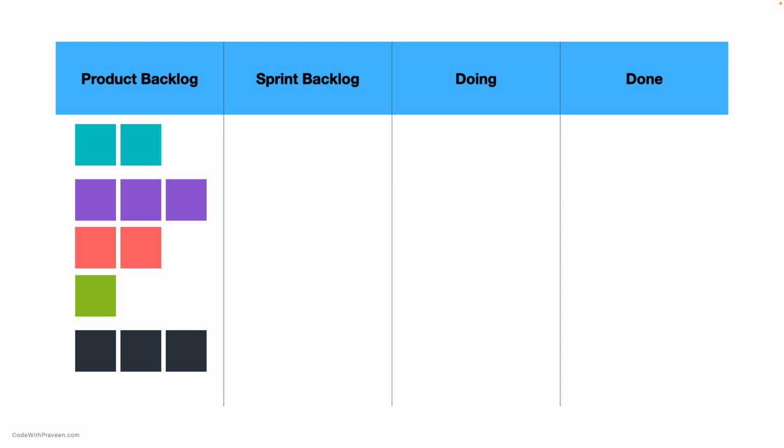The team uses a board, namely the Sprint Board, to track the items as part of the product development. The usage of this tool is needed as there can be lots of requirements that need to be tracked closely to monitor their completion. There are many tools available in the market, but the core features of all those Scrum Board products are going to be the same. First, the list of all requirements collected from the customers is grouped under the product backlog. This can contain any of the requirements that have been gathered from customers or internal stakeholders.